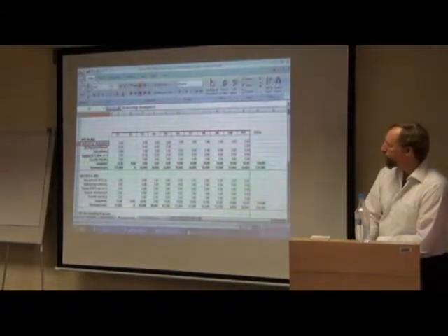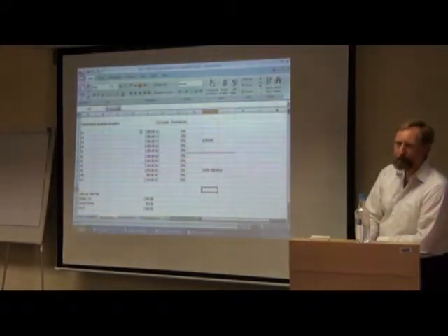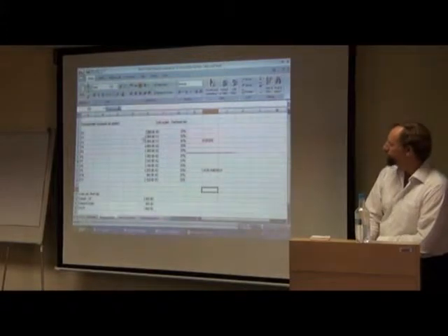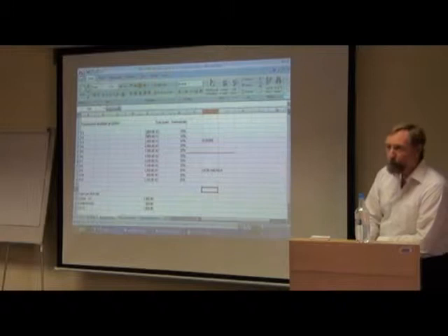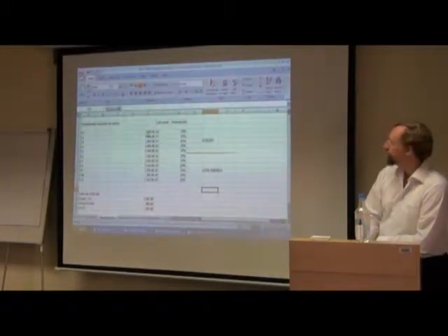How to calculate the manpower person months into euros? I've set up a separate sheet here where I calculate the average person cost per month in that partner. This partner, for example, has 3,800 euros per month as actual institutional cost for salaries.